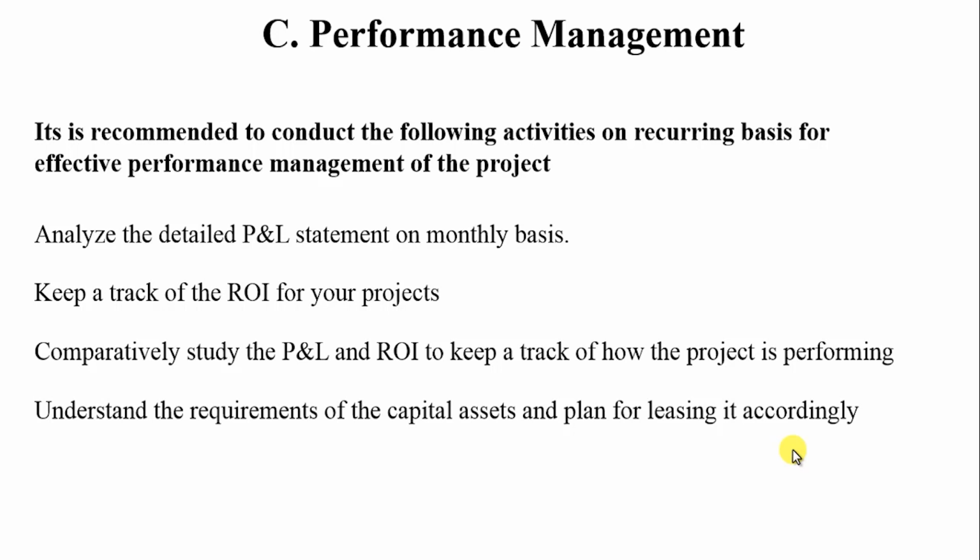If you recall, when we completed the 1 year calculations, at that point we thought it's better to lease the asset. When we extended the computation to 3 years, our decision went in favor of buying the asset. So those are the tricky parts you need to take care of as a project manager to enhance the efficiency of your project and make smart, effective decisions.